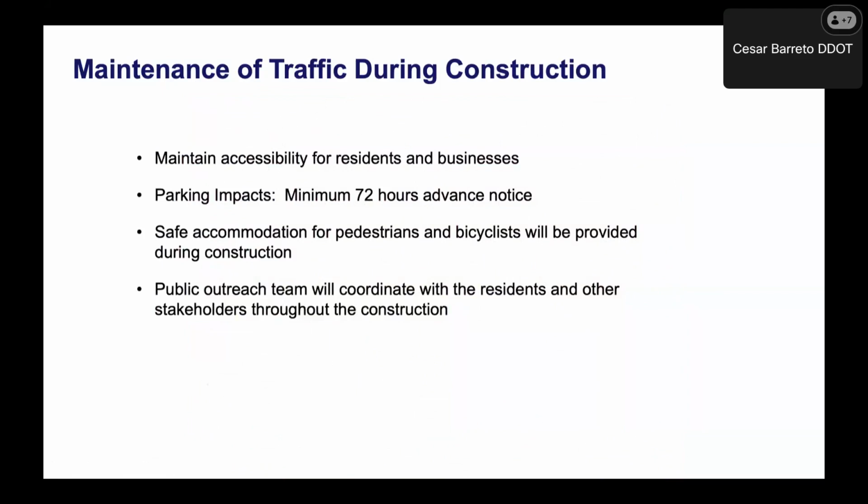Maintenance of traffic during the construction. As you know, as the District Department of Transportation, we are required to maintain the traffic during construction. We do maintain accessibility for residents and businesses. We do have parking impacts, but there will be a minimum notice of 72 hours in advance.